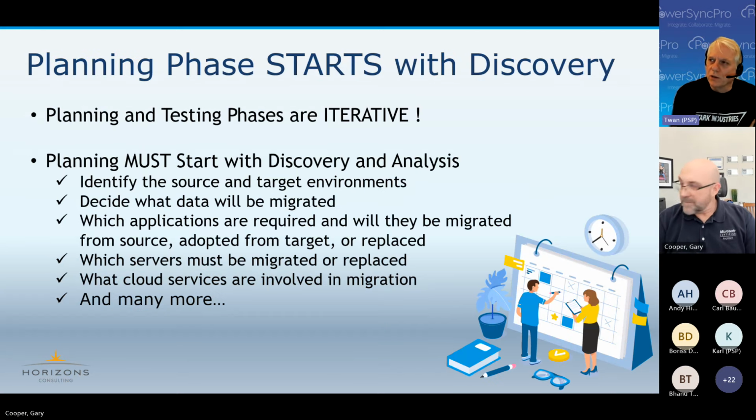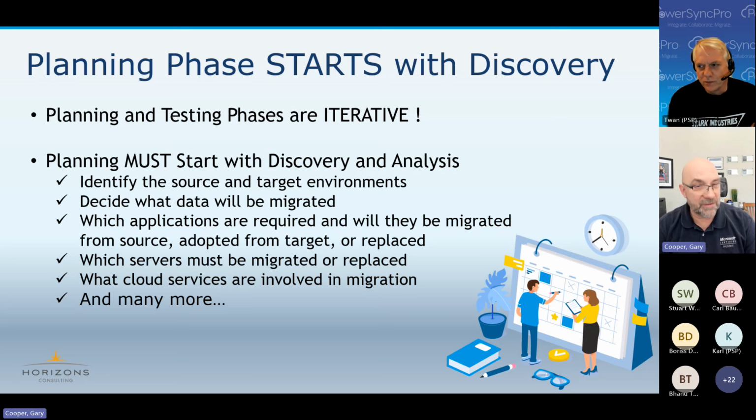Yeah, I think, Gary, we talked in the past about how companies talk now about agile projects. Everything has to be agile, fail quickly. But these kinds of projects, failure is not an option, right? You can't, like you say, you can't stop. Correct. These are generally not a good solution for agile. These are more waterfall. We definitely have a predecessor solution that says all of these 300 steps need to happen in this sequence, or other things will happen and other issues will occur. So it's really important that we define that as a waterfall.